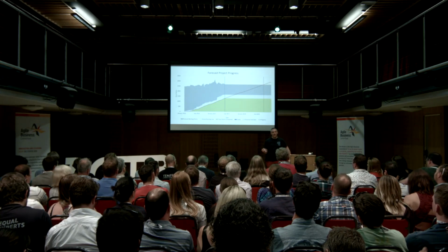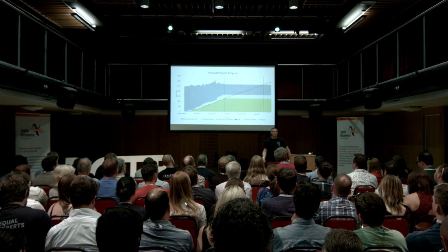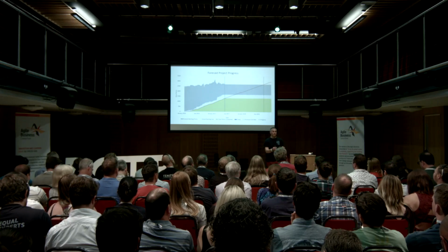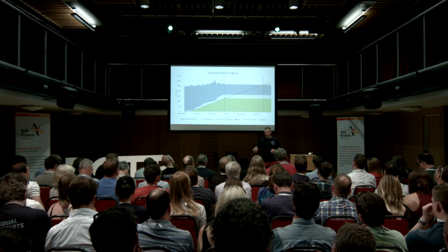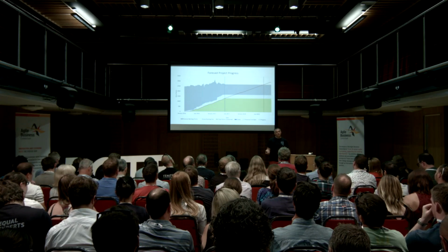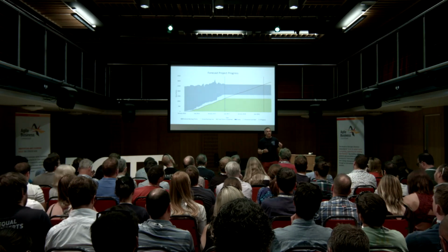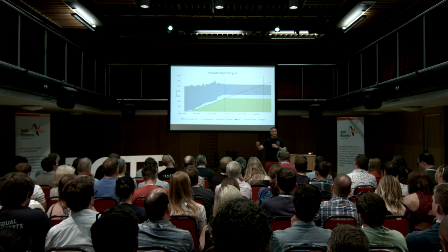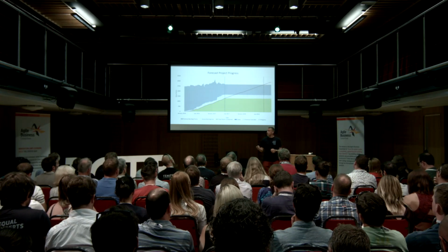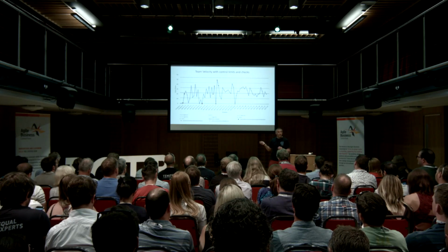So, yeah, it does work much better if you've got a stable team, but I think that's true of all forecasting. The more stable your variables, the better you're going to be able to forecast. If you have an unstable team, I'm not sure that's quite the right term, but you'd expect your velocity to be much more unstable as people leave and come back. So that will be highlighted in these sorts of charts. You'd expect to see more outliers.